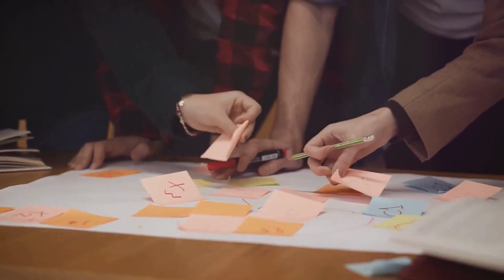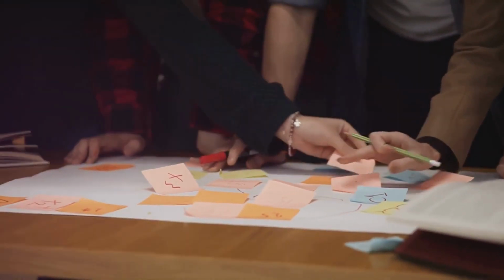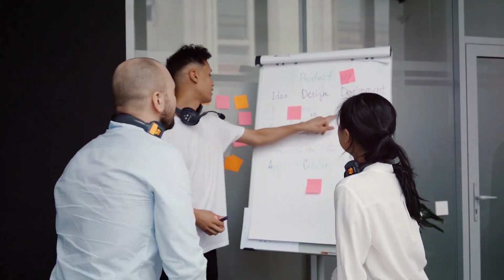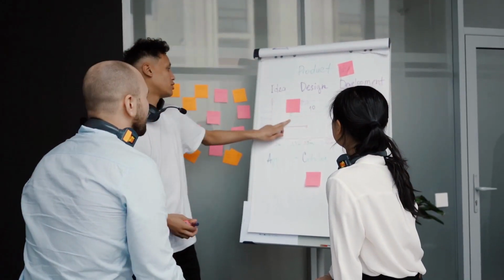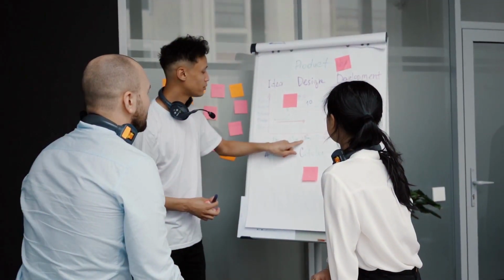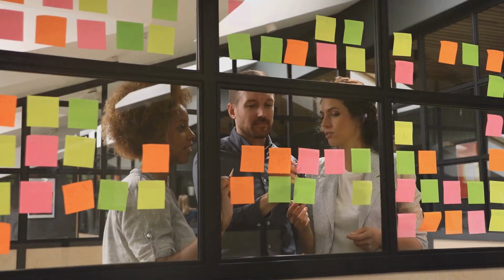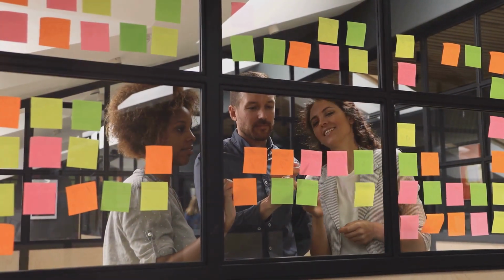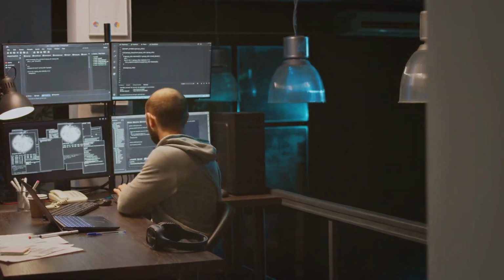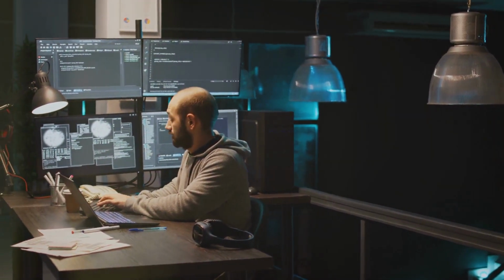Example mapping and Acceptance Test-Driven Development, or ATDD. Example mapping is a collaborative technique to refine user stories and their acceptance criteria. The team explores different examples of user interactions. These examples are used to create concrete acceptance criteria. ATDD automates these examples into acceptance tests.